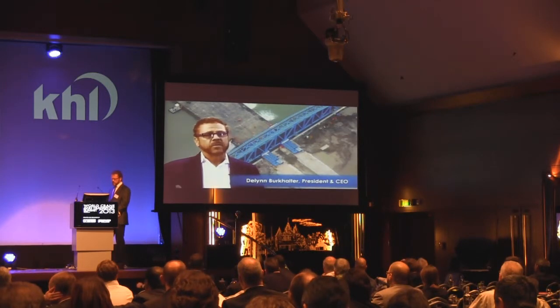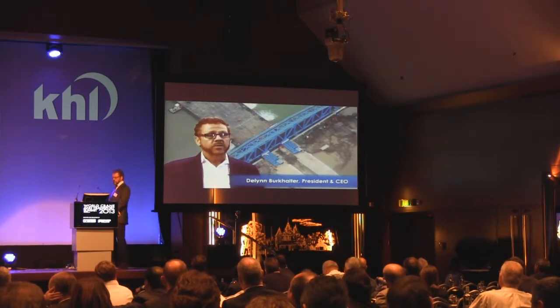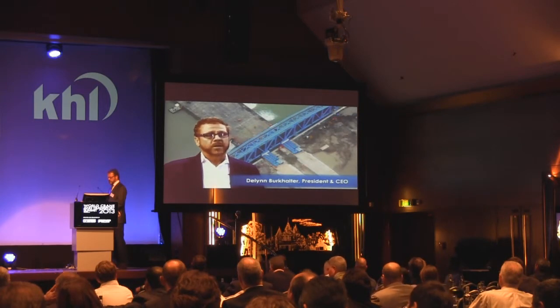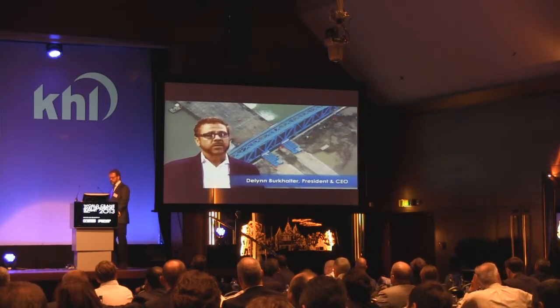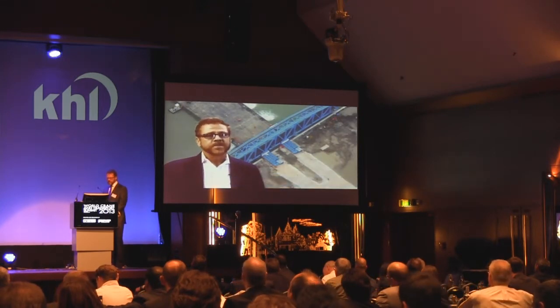Anytime you're doing that, even though you've done your research and the dock wall is good for that, it's still one of your major concerns, that you put forces on that dock wall that cause it to start fading out into the water. So we had fixed a point there and pulled a tape measure and monitored that very closely to see if there was ever any movement in that. And I'm pleased to report that it never was.